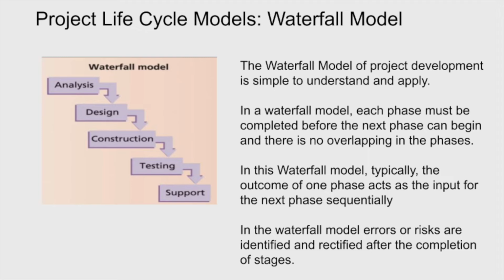Let's do an analysis of the problem. Let's design a solution. Let's build the solution. Let's test the solution, and then put the solution in place and support it. One phase has to end before the next phase begins, and the ending of one phase really sets up the next phase. So it naturally flows in. One thing naturally flows into another.